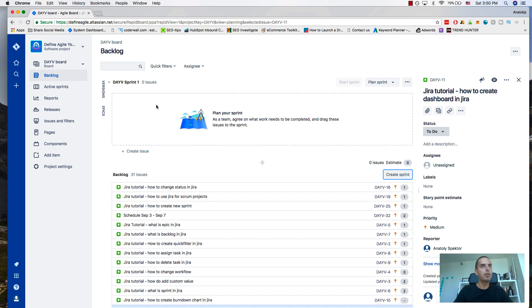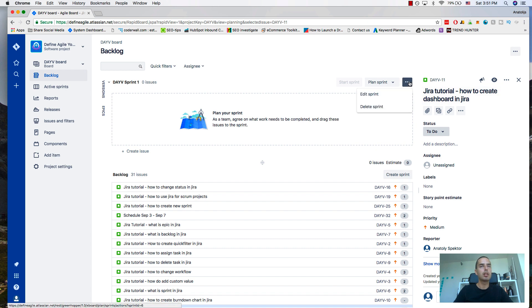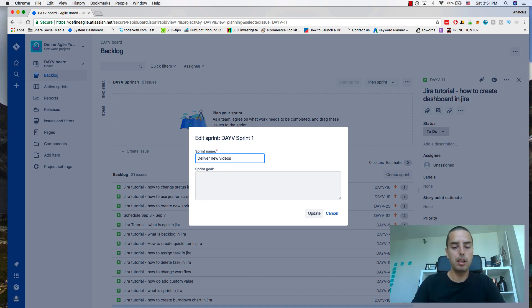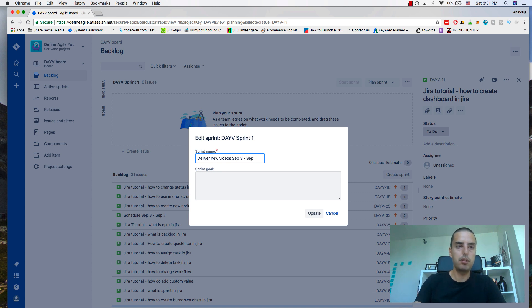I don't really like the name, so let's change the name first. I click on here, then I click edit sprint, change the name, and then I will put a date: September 3rd to September 7th.